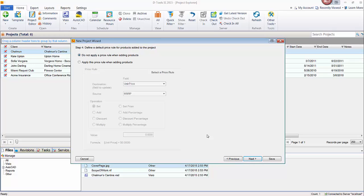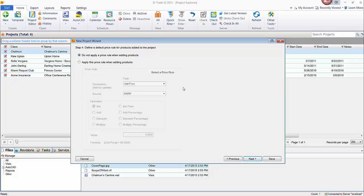Your next step would be if you want to apply a price rule to a project. This would be something along the lines of saying for every product that I add, take the existing price in the catalog and subtract X percent off, 10% off if you wanted to do that, if you're trying to apply an overall global rule to the items that get added to a project. You don't have to do this. If you don't set a price rule here, the items that are added to a project will just take their existing price from your catalog. And then at that point, you can pick and choose if you want to discount items or change the margin or price on them.